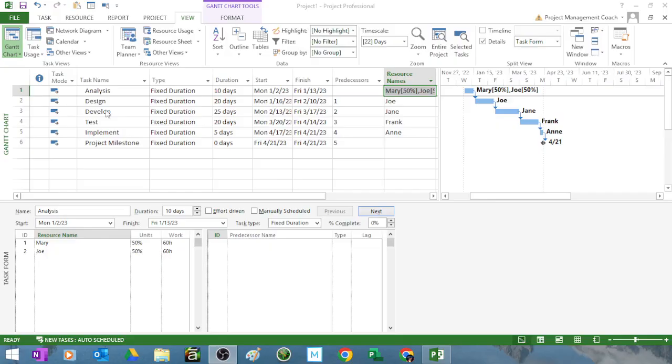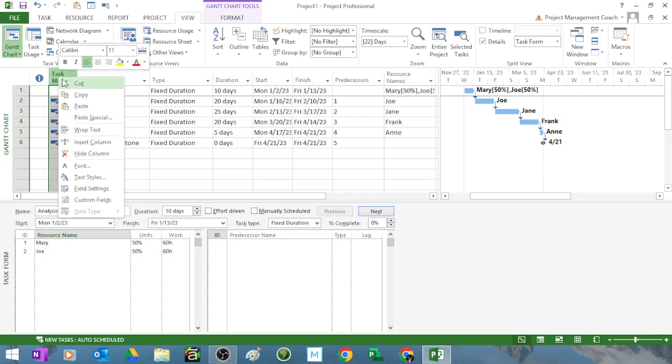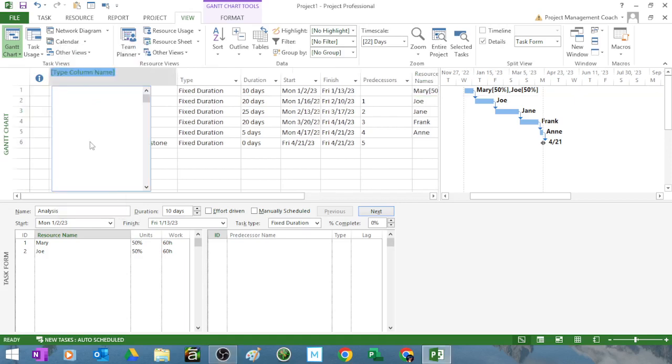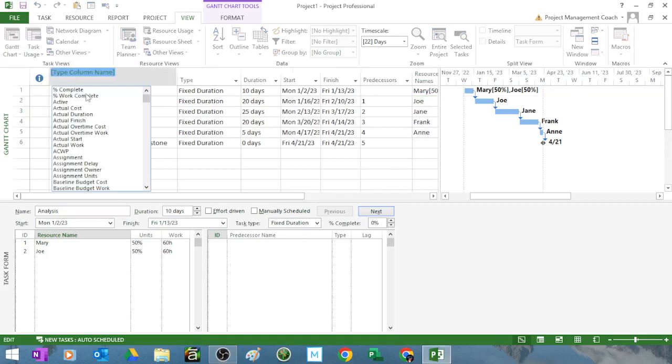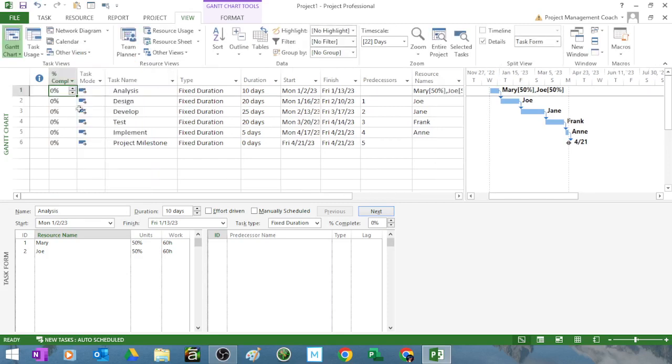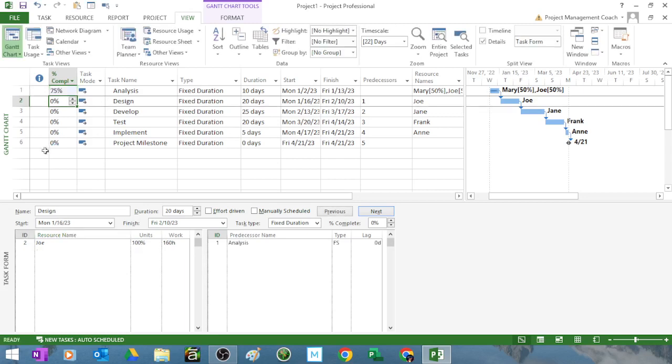In order to track your project, which is the last thing you typically would do, you can right click and insert a work complete column if you're tracking with effort. Or you can just do a percent complete. And as it gets done you type in what percent done you are. And you have a little progress bar over there showing you you're 75 percent done.